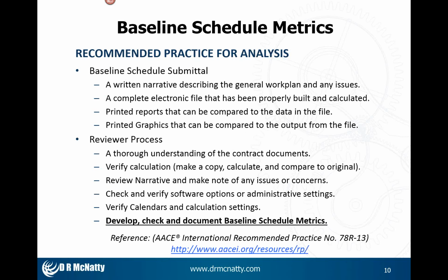What should the submittal include? Okay, well, there should be a written narrative. And it's amazing how it's like pulling teeth today still to get a narrative to accompany a schedule. A narrative is, in the contractor's own words, a description of how they're going to approach and build this project. I think it's very important that the narrative become part of that original submittal.